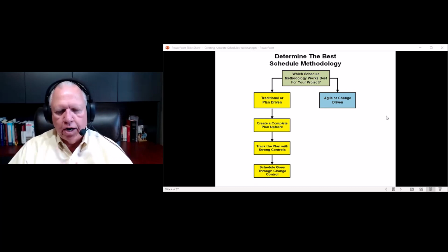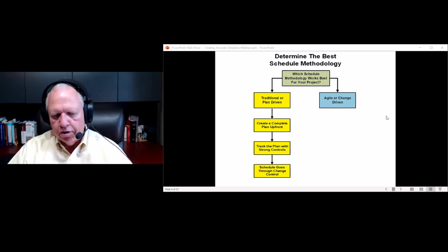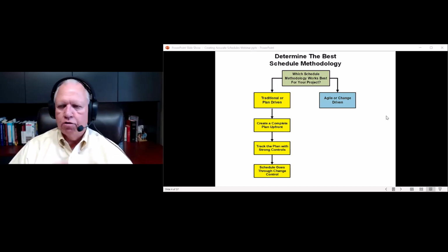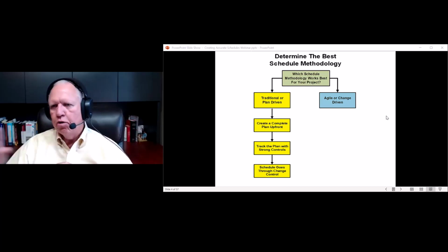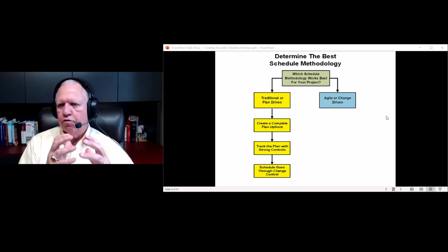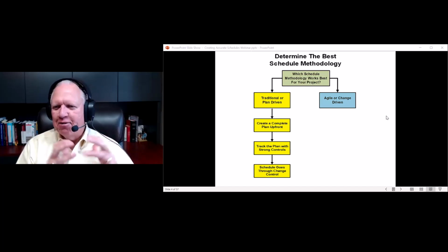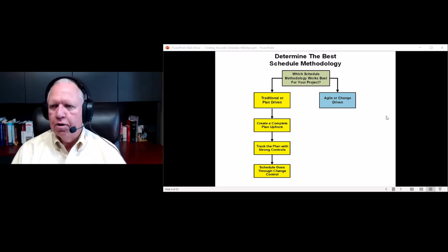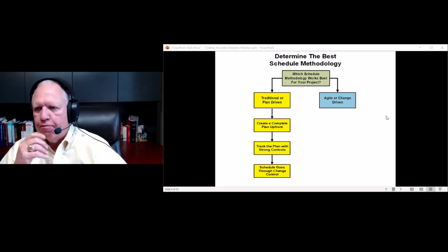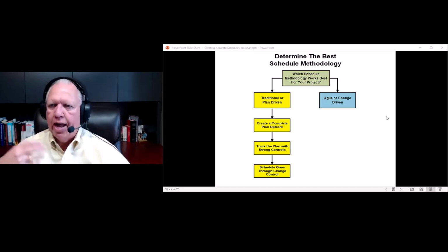I know you're creating a complete plan up front. You're tracking the plan with strong controls, because that's what traditional is. It's a command and control type of method. And of course, the scheduling goes through change control. We schedule everything, we baseline it. Once we baseline, from that point on, it goes through change control, command and control. Nothing happens without us knowing about it, and that's what we want. And there's not anything wrong with this. There are many projects that this absolutely should be the lifeblood of what we're doing and how we're doing it.